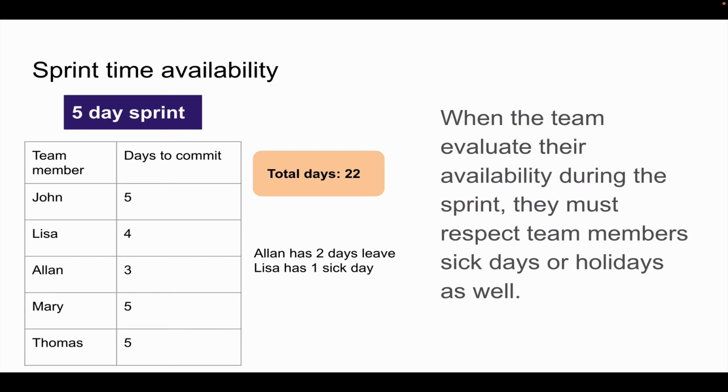So in this case, we have the team members here: John, Lisa, Alan, Mary, and Thomas, and the total number of man days available is the sum of all the days that they commit to, which is 22 days.